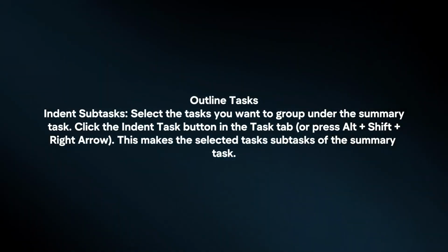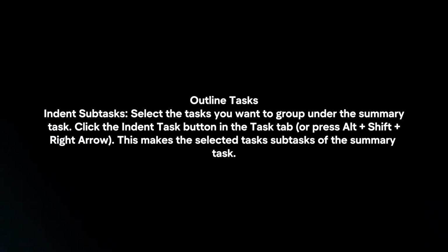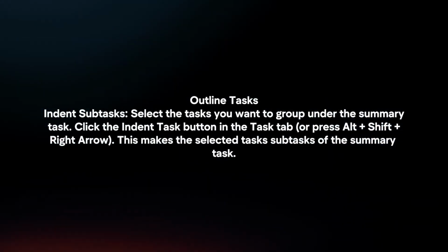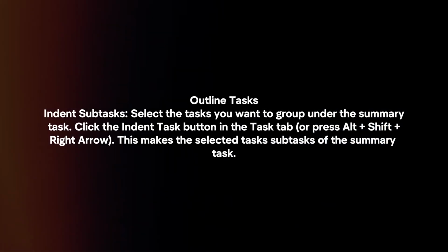Outline tasks. Indent subtasks. Select the tasks you want to group under the summary task. Click the Indent Task button in the Task tab. This makes the selected task subtasks of the summary task.